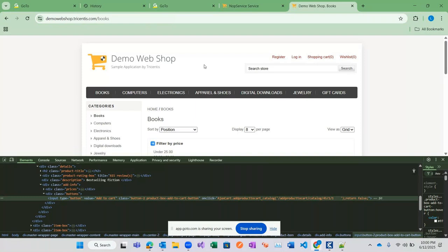But the scrum master, what they will do, based upon the user stories, some we need to pick immediately, develop, and test. For example, we have computers and electronics. When compared to electronics, computers is the first priority. Whenever computers becomes the first priority, based upon that, the scrum master picks this user story and assigns it to the developer.